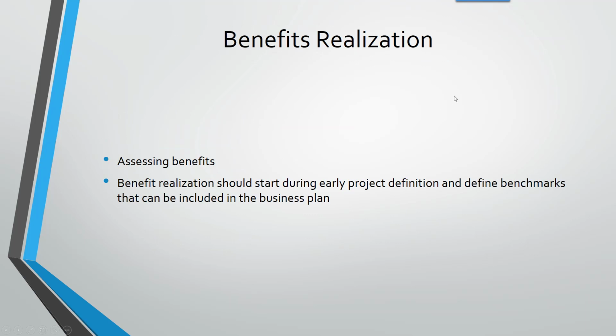Benefit realization. Assessing benefits and benefit realizations should start during the early project definition and define benchmarks that can be included in the business plan. So early in the project, you need to define some goal points or set points that will be milestones that you can say, okay, this is the point. It could be time, it could be a point in the process. Okay, at this point now we're going to see where we are, and are we on track, or do things need to be adjusted? And that's it.